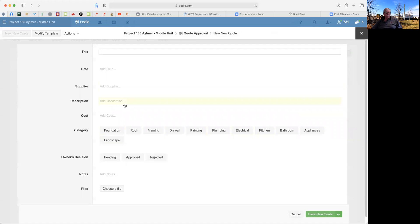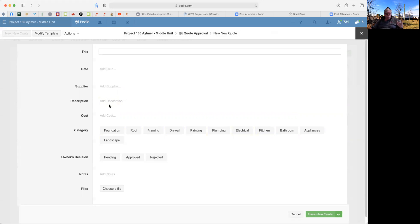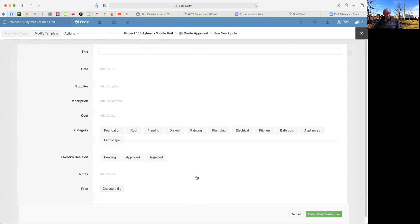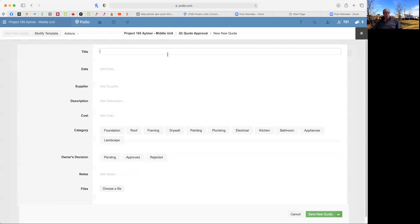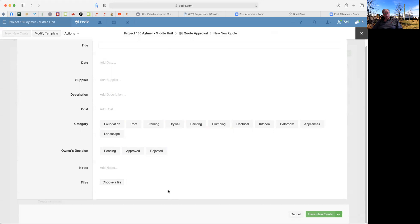It's the same as in the description, for example, the cabinets, we might say there's a five-week delivery or a seven-week delivery. You might choose to pay a bit more because the timeline is shorter, or you might choose to pay less because you have more time, whatever your case is. Then you input your decision here if there's notes from either side. And typically, you will see the quote uploaded, and a copy of it here, which will describe, should describe in more detail exactly what you get for your money.